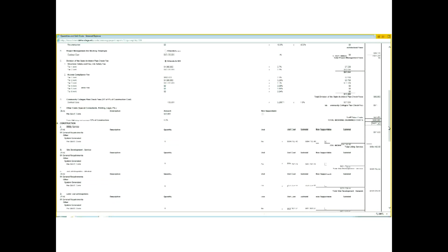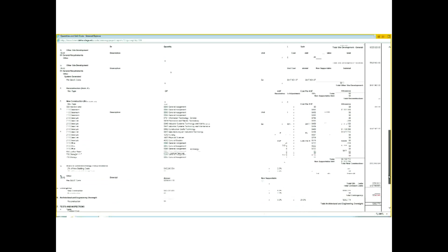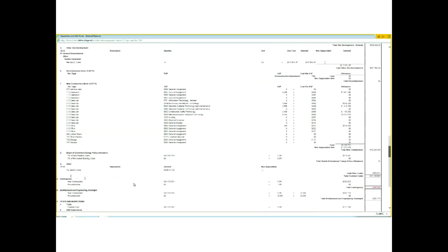And so we're getting through P and W fine, but we can see that as we get to the construction portion, for example, the contingency amounts, even though they do reconcile, the total is in red, so it's in the overwritten form. So we still want to get rid of it so that the total here does not stay stagnant as the project progresses and gets updated. So we would just simply zero it out or delete it.